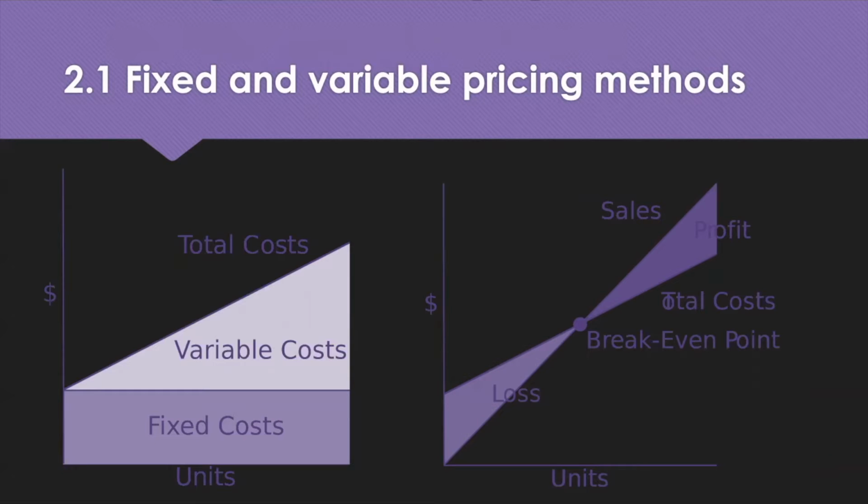Managing costs successfully depends on the nature and the understanding of the costs faced by a programme or a project. The pricing strategy negotiated with suppliers is critical to ensure costs are controlled and profits are maximised. One of the most important factors is to confirm whether contracts will be fixed or variable in terms of pricing strategy. Fixed pricing is a strategy where suppliers estimate their costs and their fees and use that as a basis for bidding for a contract.